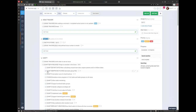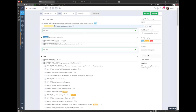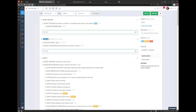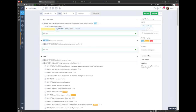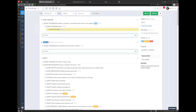Or if you're running campaigns, you might have task lists called Prepare, Run, and Analyze. For creating subtasks, it's very easy — you just pull a task to the right side and it creates a subtask. You can even create sub-subtasks by nesting further. On all paid plans, you can create unlimited sub-tasks. If you want to break the dependency, just pull it back out. Now one is just a task and the other is a task with sub-tasks.